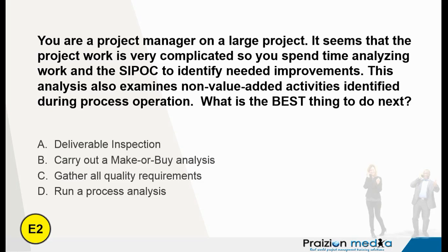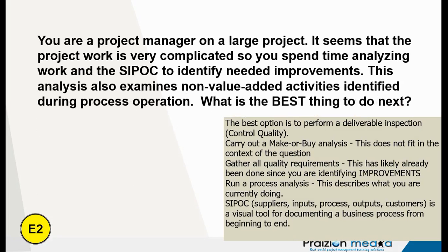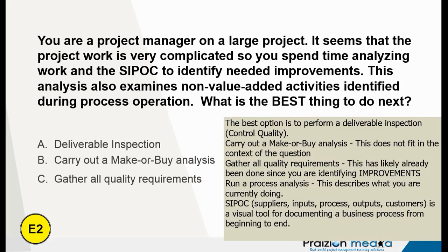Okay, I'm going to show you the answer in 5, 4, 3, 2, 1. The best thing to do is deliverable inspection. So if you read in between the lines, folks, here's the rationale. The best option is to perform a deliverable inspection in control quality.